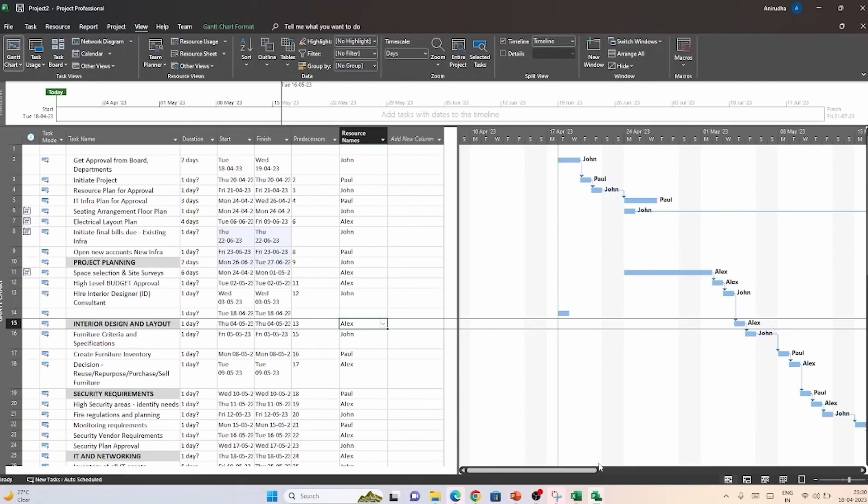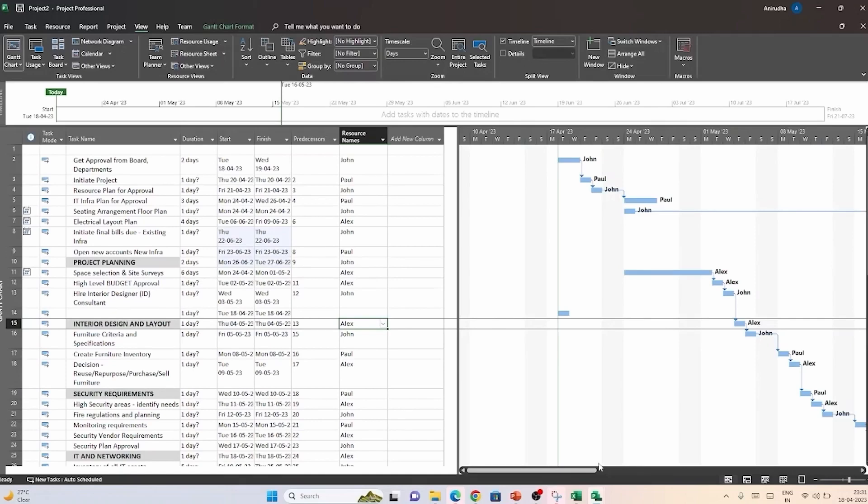All of these activities are typically done in the initial phase of the project. And this is where many project managers typically stop using project as they are missing out on the most powerful utility of this application. Because Microsoft Project allows you to track, analyze, monitor and control through the entire length of the project life cycle. When you have verified that everything is in order and you have got approvals from the management and the customer, it is time to baseline your schedule. A baseline is essentially a snapshot of your project at a given time.